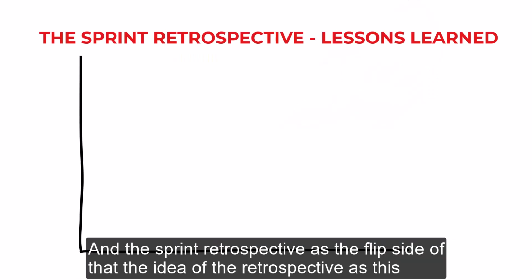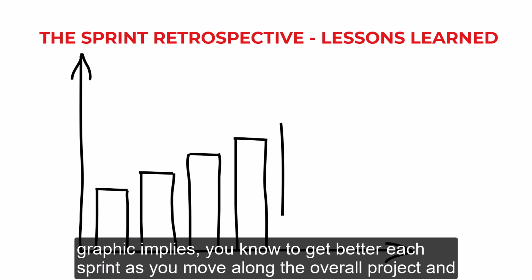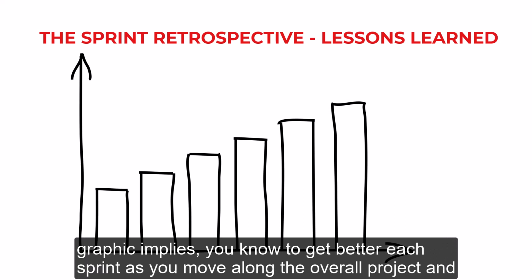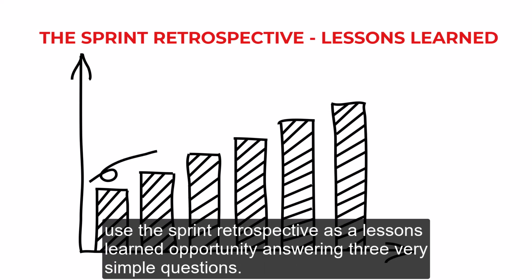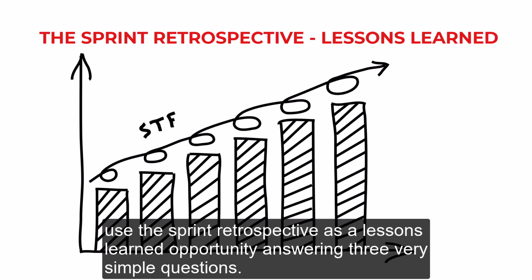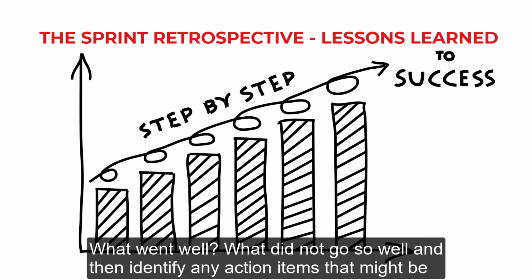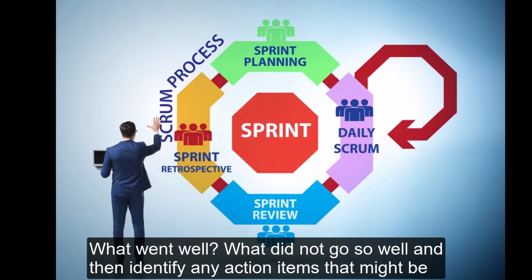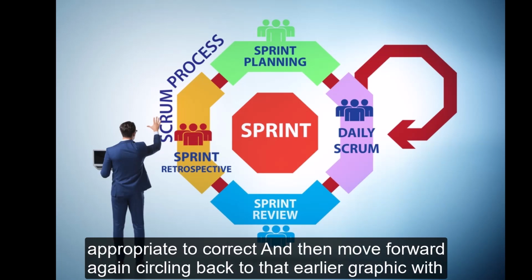And the sprint retrospective is the flip side of that. The idea of the retrospective, as this graphic implies, to get better each sprint as you move along the overall project, and use the sprint retrospective as a lessons learned opportunity, answering 3 very simple questions. What went well? What did not go so well? And then identify any action items that might be appropriate to correct and then move forward.